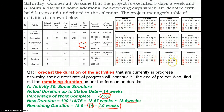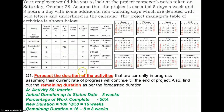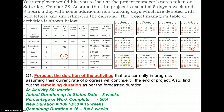That means roughly around the first or second week of December we would be finishing work on the superstructure activity. Likewise, we have to report progress of the second activity in progress, which is interior works. For interior works, the activity started on 31st of August. Counting the weeks to the reporting date: week one, two, three, four, five, six, seven, eight — eight weeks and a day, but accounting for a holiday, it works out to eight weeks.